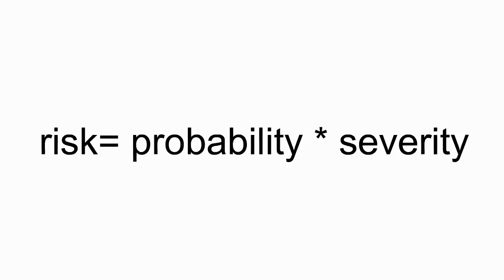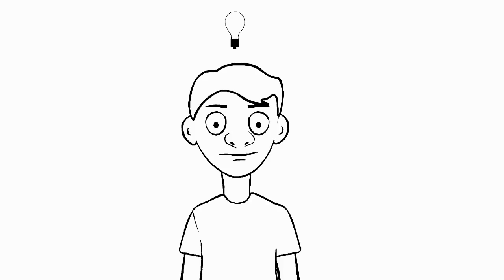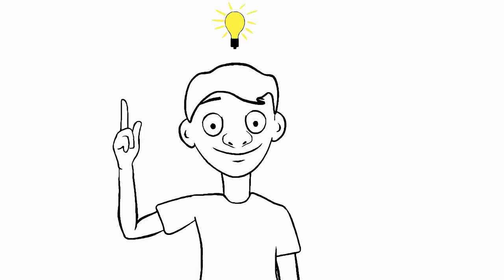First, the risk formula. Basically, it says that risk depends on 2 factors: the chance of the event happening and its severity. So in the first example, the risk of a person tripping on the electrical cable is a combination of the chance that someone will walk in the corridor and trip on the cable and how big the injury will be. The formula will help you see basic components of risk and thus understand them and be more confident and objective when analyzing them.